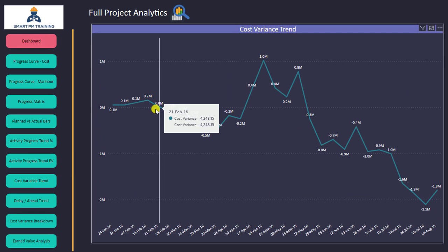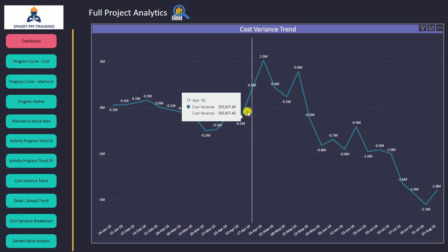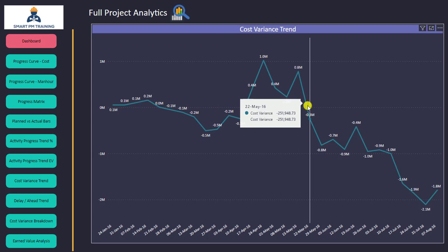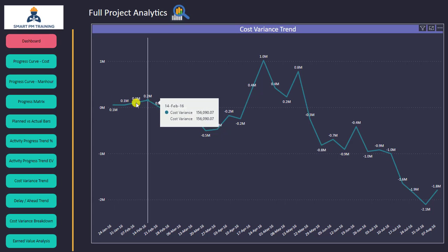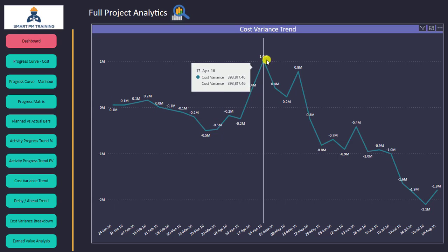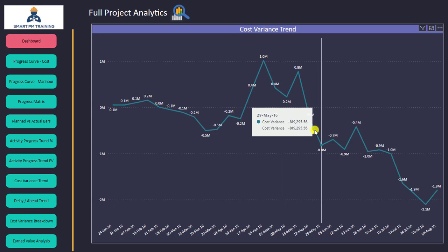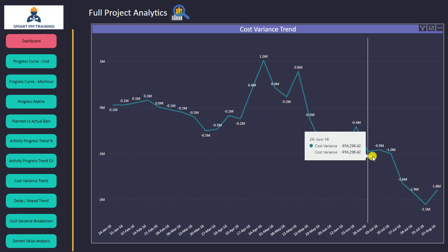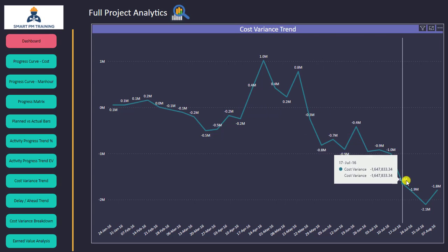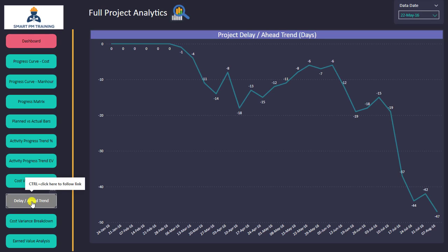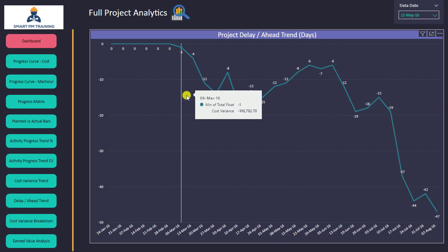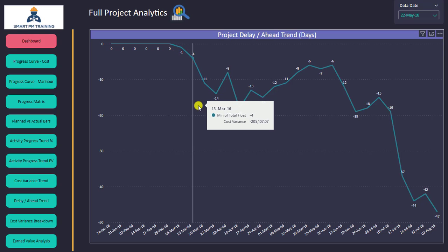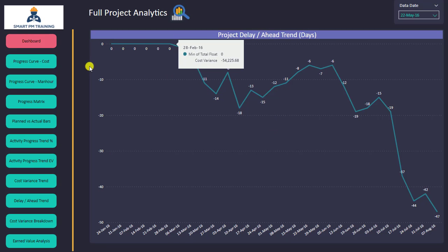I can use the whole ground floor and podium area, do whatever I want — finishes — and this is my cost variance trend, showing how much I am falling behind planned progress. The cost variance is shown over time: I was a little bit ahead during one period, then it fluctuated, then from one point onward the cost variance increased. The delay and ahead trend chart is similar but shows project delay in days rather than cost variance.